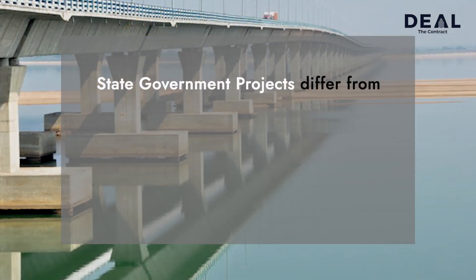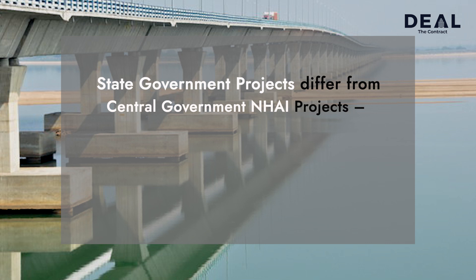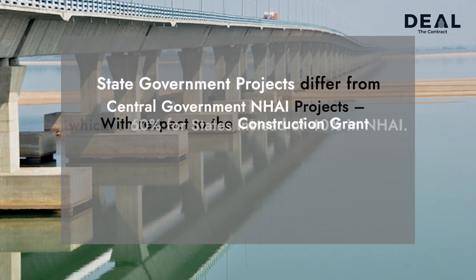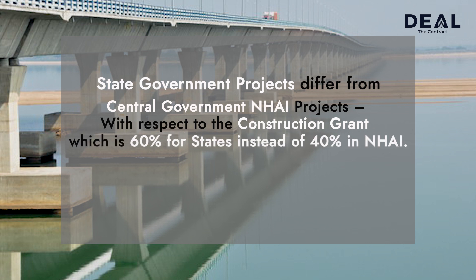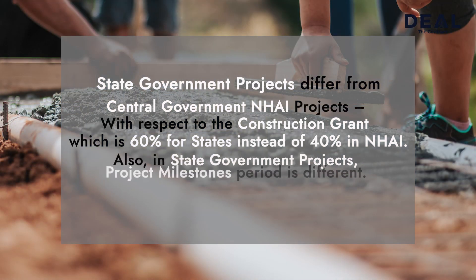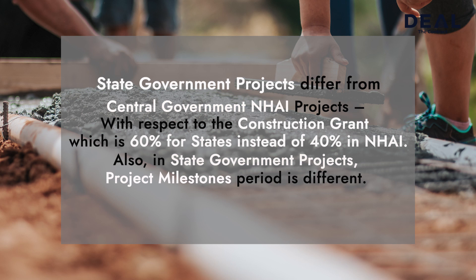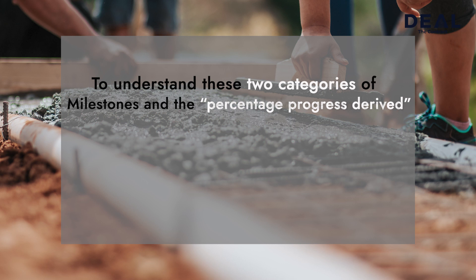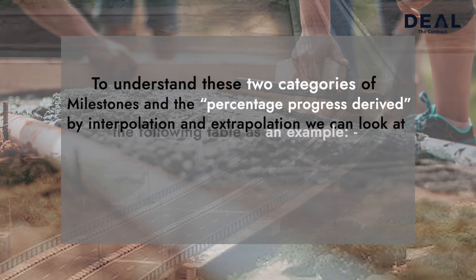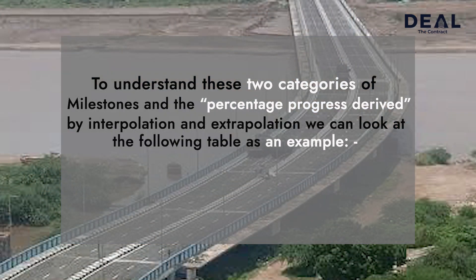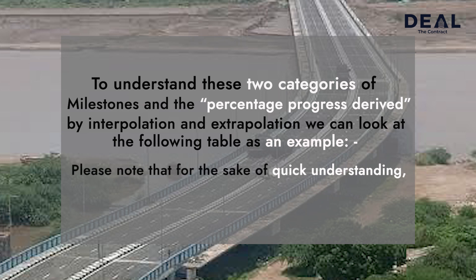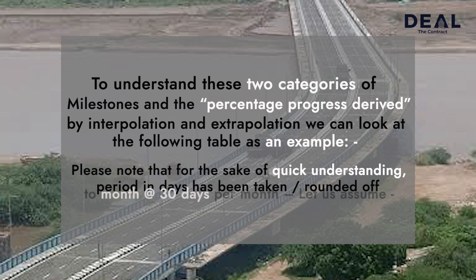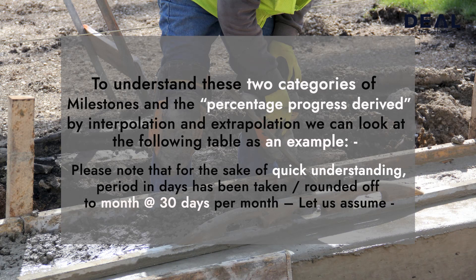State government projects differ from central government and NHI projects with respect to the construction grant, which is 60% for state instead of 40% in NHI. Also, in state government projects, the project milestone periods are different. To understand these two categories of milestones and the percentage progress derived by interpolation and extrapolation, we can look at the table as an example. The period in days has been taken and rounded off to months at the rate of 30 days per month.